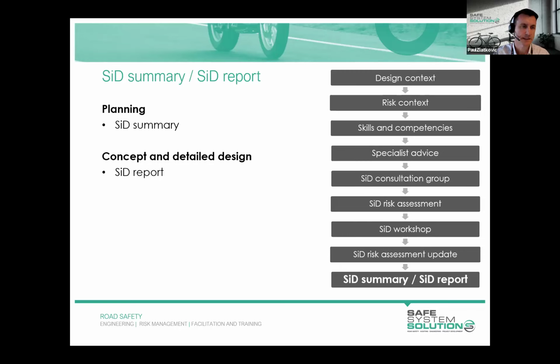For concept and detailed design, a formal safety and design report is to be prepared. Again, that'll be important because that'll be a standalone document and it will be part of the information package that will be transferred to those workers that will construct the structure, maintain or operate the structure.